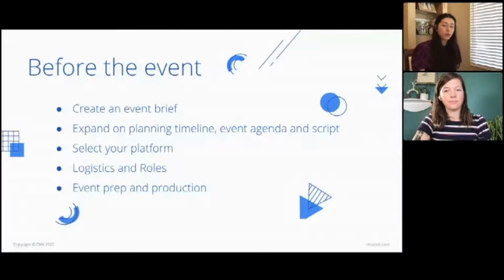You need an overall event manager, MCs, one per stage, a speaker manager to check in your speakers, and tech support who lives off your platform and just sits in HQ. This was done on Slack for us. Then chat box moderators. Honestly, the more, the merrier. They flag issues, they make sure everyone is participating and engaged and that everyone follows the code of conduct. The list for chat box moderators goes on.